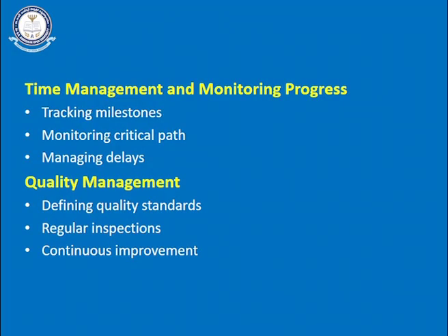Here I told you that PERT and CPM are used to monitor and schedule the activities. PERT and CPM are two important techniques in project production. PERT is the Program Evaluation Review Technique, which is used where the time frame is uncertain. There is uncertainty in activity durations, and PERT helps us in estimating the possible time to complete that particular activity.